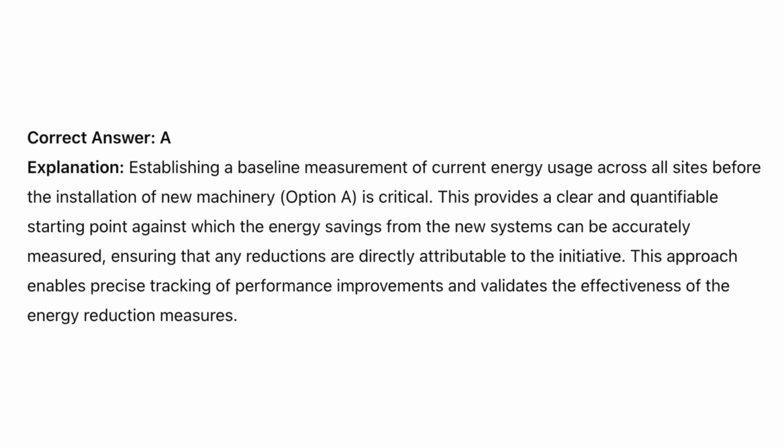Correct answer A. Explanation: establishing a baseline measurement of current energy usage across all sites before the installation of new machinery, option A, is critical. This provides a clear and quantifiable starting point against which the energy savings from the new systems can be accurately measured, ensuring that any reductions are directly attributable to the initiative. This approach enables precise tracking of performance improvements and validates the effectiveness of the energy reduction measures.